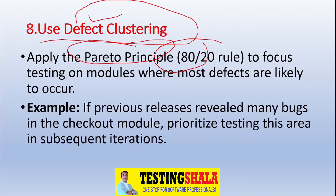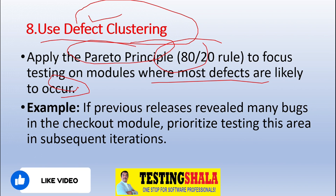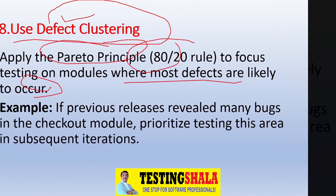The eighth method is defect clustering, applying the Pareto principle — the 80/20 rule. We focus testing on the modules where most defects are likely to occur, concentrating on roughly 20% of the modules that yield 80% of the defects. This way, within less time you can find more issues, and by fixing them you can release the product more quickly.